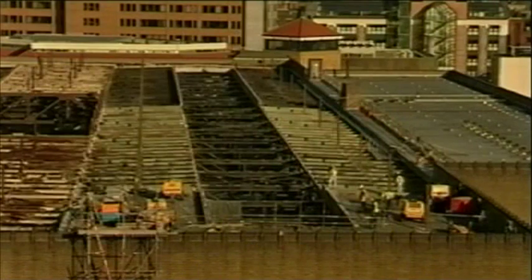Having cleared the asbestos, we've now got to take the roof off across the turbine hall. So, you know, it's starting to stack up against us, really, because we'd actually made a good start on the substructures, and now we're interrupting that progress. We're starting to eat into continuity, and it's a problem.